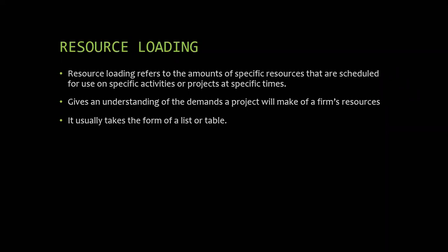Same thing is true of human beings. Suppose 10 workers are with you, but for the first 10 days only 5 workers are required, and after 10 days the next 5 workers are required. Then for those first 10 days you should not pay salary to the remaining 5 workers for not doing any work. So we have to keep that particular balance between loading, allocation and smoothing.